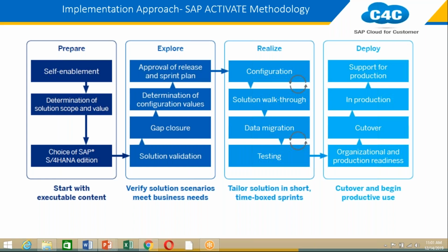So this is what an explore phase. Then comes the realize phase, which is really a longer period of implementation. The realize phase normally takes 6 weeks if it's a very small project. If it's a big project, it can go beyond 20 weeks. So realize is a big phase where we do all the configuration and customization activity, and all the development activities along with the testing activities are carried out in the realize phase.